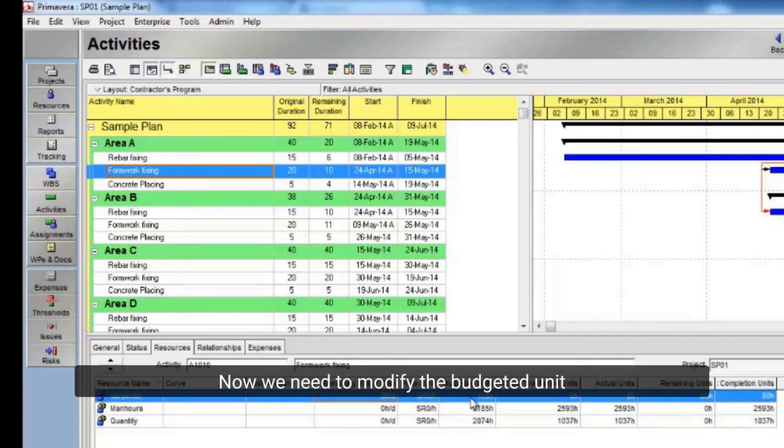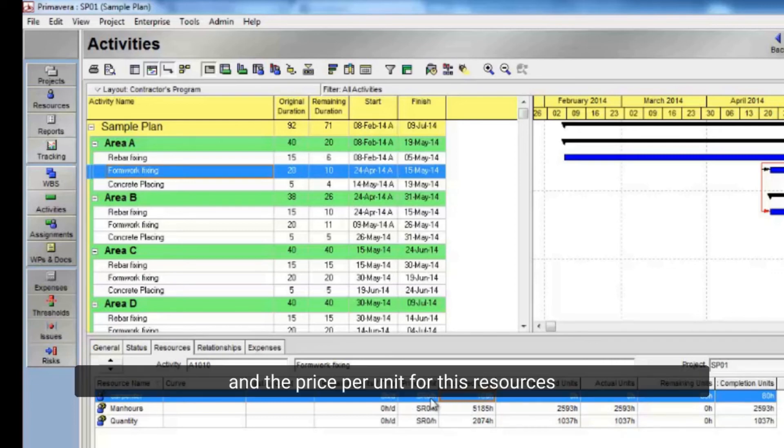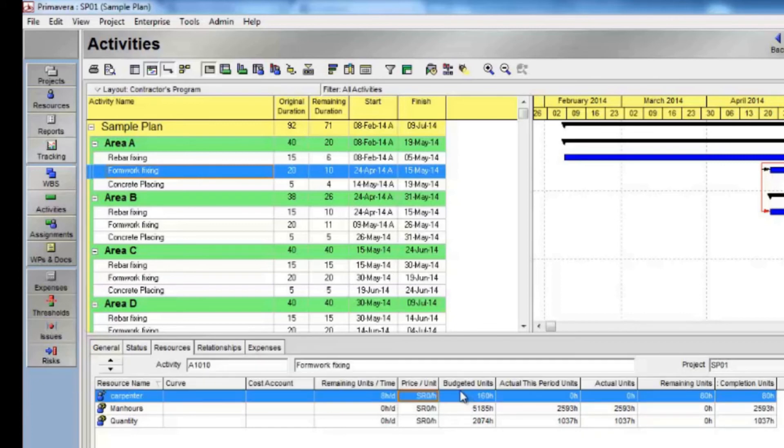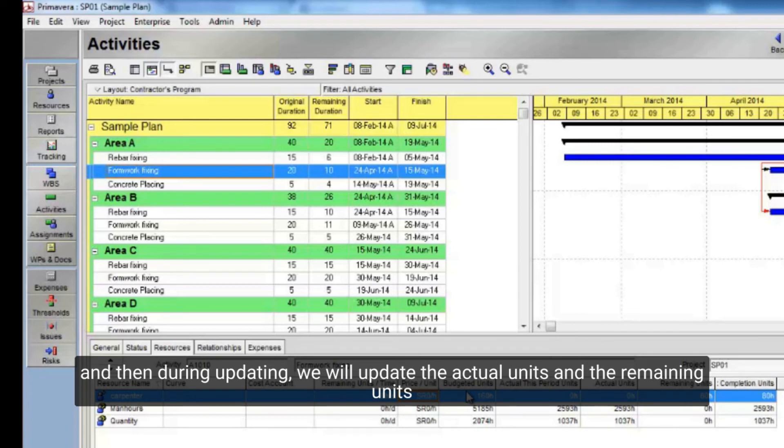Now we need to modify the budgeted unit and the price per unit for these resources. We should do this according to the productivity, quantities, and rates the company is providing. And then during updating, we will update the actual units and the remaining units.